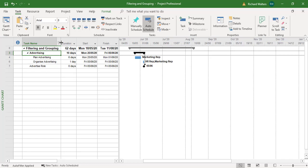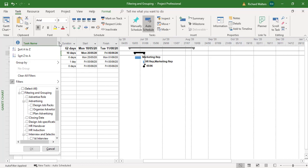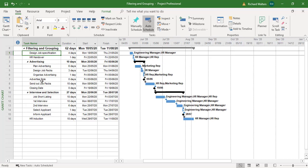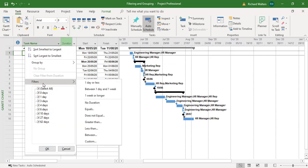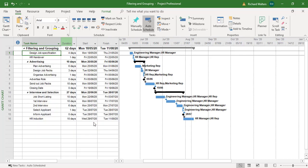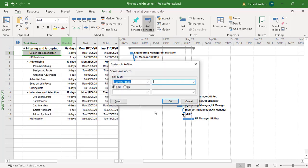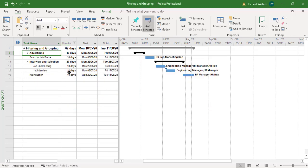Clear the filter by going back in the drop down arrow, clear our filters. We could do go with duration. I could say I want to see everything that is greater than say seven days. And here we go. Clear it again.